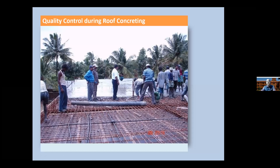Here is the interesting practical part — quality control during roof concreting. During concreting, the water-cement ratio must be maintained, compaction and vibration done properly, and uniform slab thickness maintained. The reinforcement — top bars and bottom bars — must be effectively placed with cover blocks. Electrical conduit work must be intact, and binding wires properly tied with side supports in place. This is the kind of standard we need to follow while doing concreting.